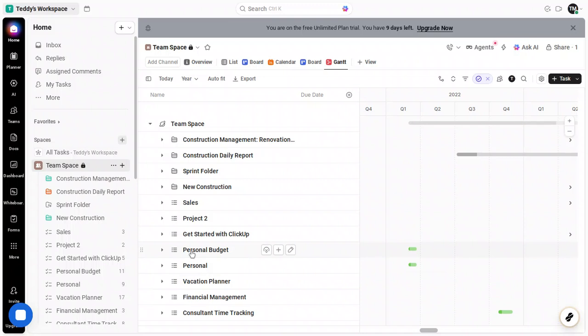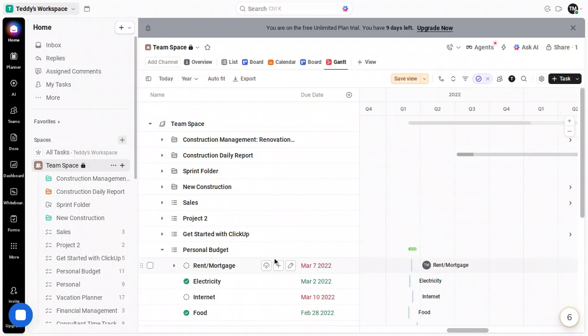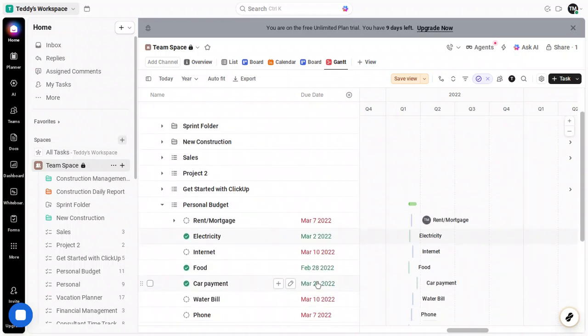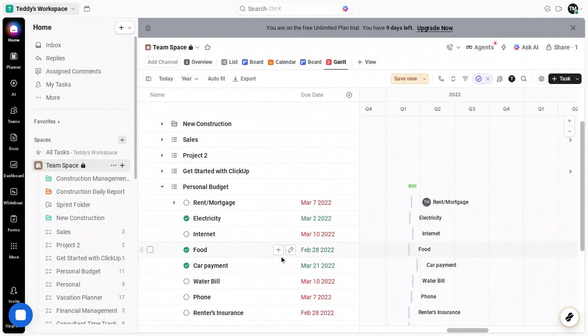Before we adjust how the Gantt chart applies colors, set a priority level on your selected task. Priorities in ClickUp typically range from urgent down to lower levels like high or normal, depending on how your workspace is configured. Select the priority field and choose the one that fits your demonstration. I'll pick urgent so we can see a strong visual contrast later.